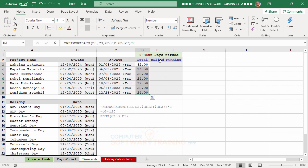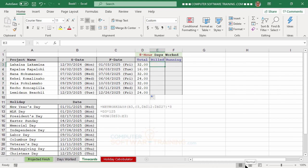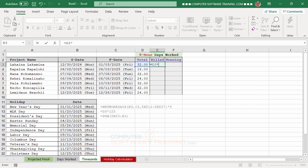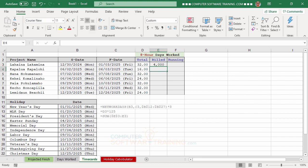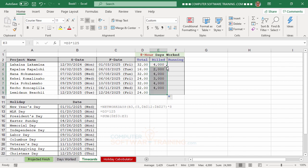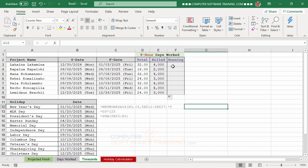We then calculate the billing amount by taking the total hours and multiplying by $125 per hour. We type equal, click the hours cell, times 125, press Enter, and copy the formula down.